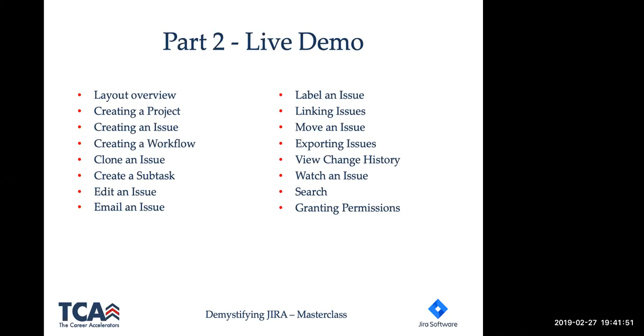So there will be a JIRA administrator. Then depending on the organization, there may be also a project administrator. So the JIRA administrator will be responsible for creating the project, and the project administrator will be able to grant people different levels of access depending on what their role is. So that decision will be made outside by a project manager, or the project lead, whoever is responsible for the project, who will make that decision outside, and then that decision will be communicated to the JIRA or project administrator, who would implement it within JIRA.